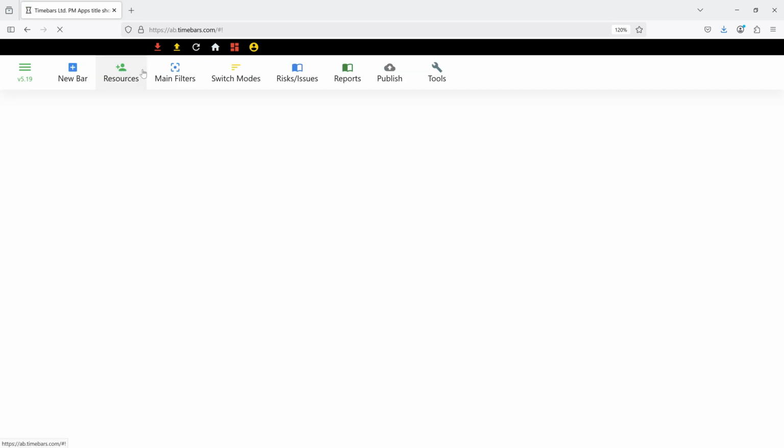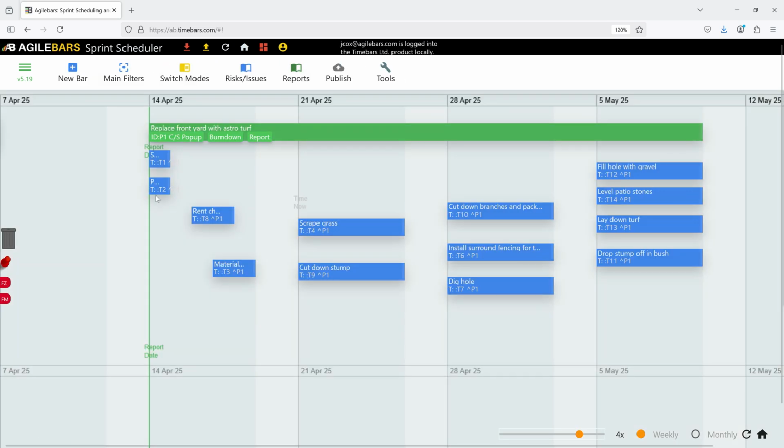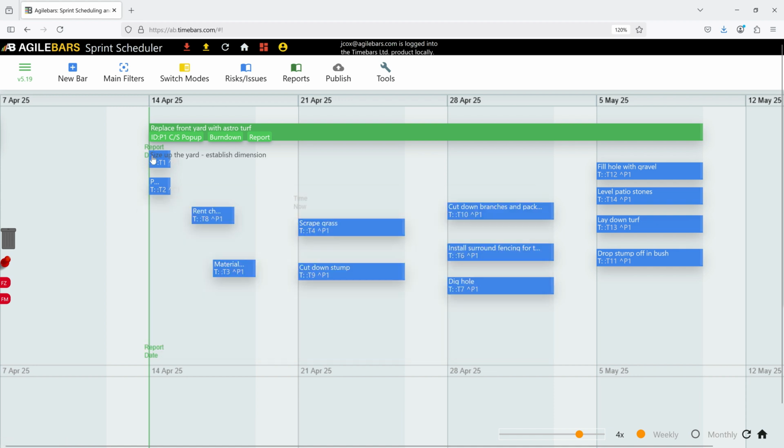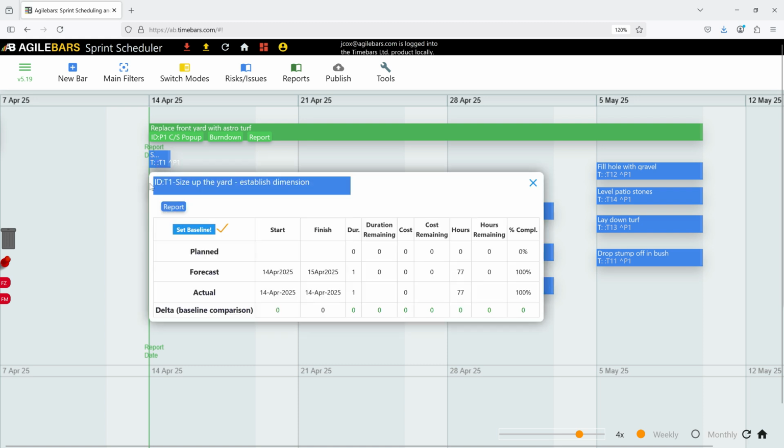No more chasing people for percentage updates or fiddling with spreadsheets. That seems to be the big sell. It's automated earned value calculation, basically, based purely on the card's position. And that directly feeds the progress tracking and those burn down charts. That's the link. It makes the progress data objective, tied to the actual workflow state on the board.